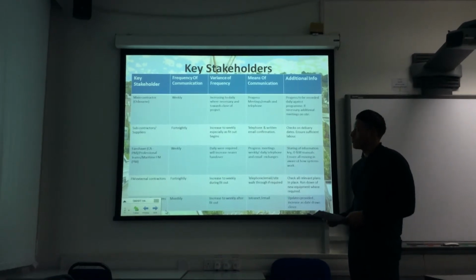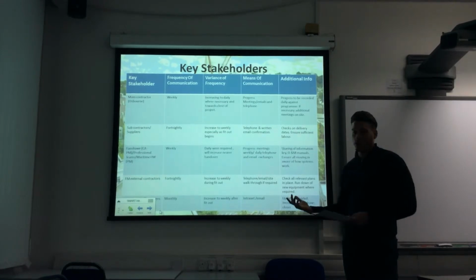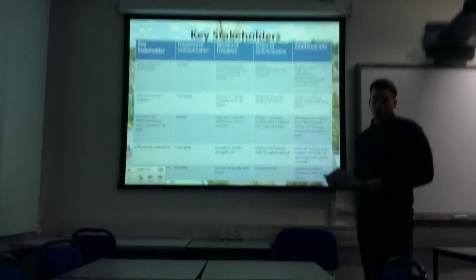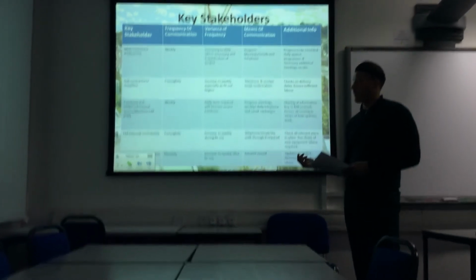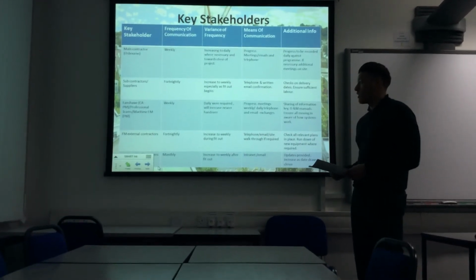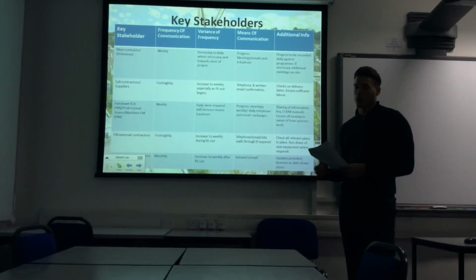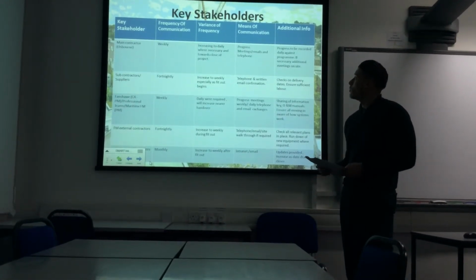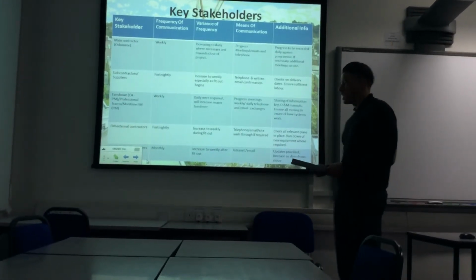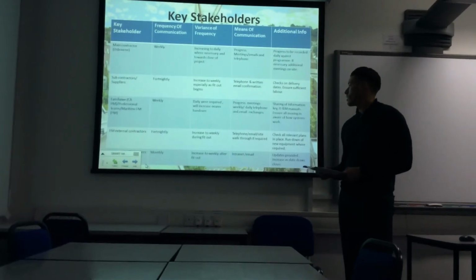Next we look at the management side, and we have the PMs from the maritime and also from the CA and then the professional teams. These would be spoken to and communicated with on a weekly basis, and then daily where required, and that's where the variance would be. Nearer to handover, the smaller details would be being sorted, so communication would increase. Again, this is very similar to how it would be with Osborne, the main contractor. It would be progress meetings on site and then daily telephone and email exchanges.